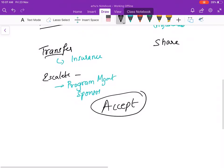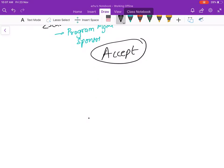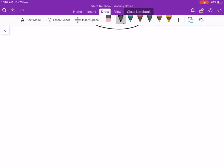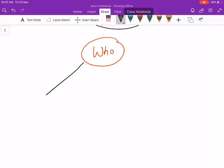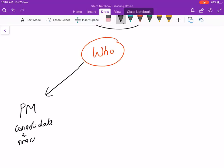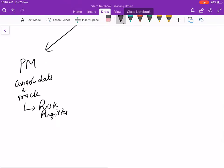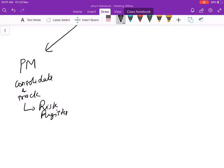Let's go a little bit more in detail. Who is responsible for risk? It is the PM's responsibility to consolidate and track the risk. He does this through a risk register and he will also have to look at the risk report.